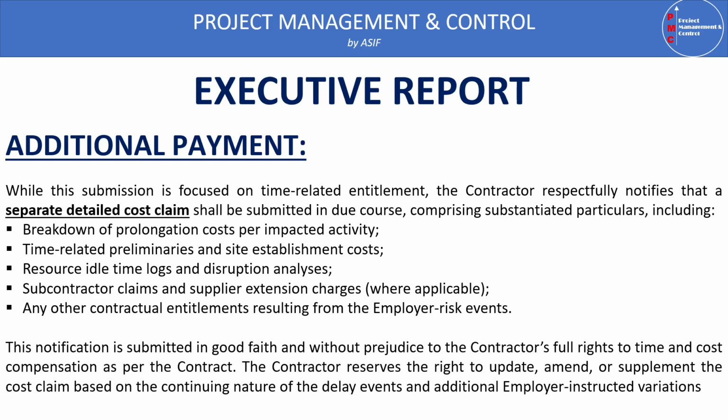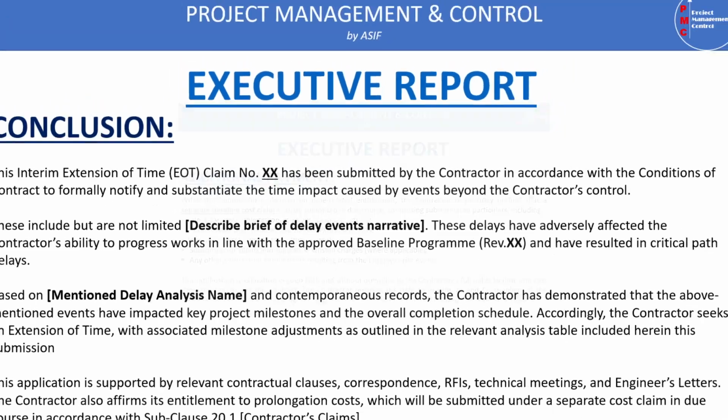This notification is a submission in good faith and without prejudice to the contractor's full right to time and cost compensation as per the contract. The contractor reserves the full right to update, amend, or supplement the cost claim based on the continuing nature of delay events and additional implied instructed variations. In this way, you can provide additional cost.